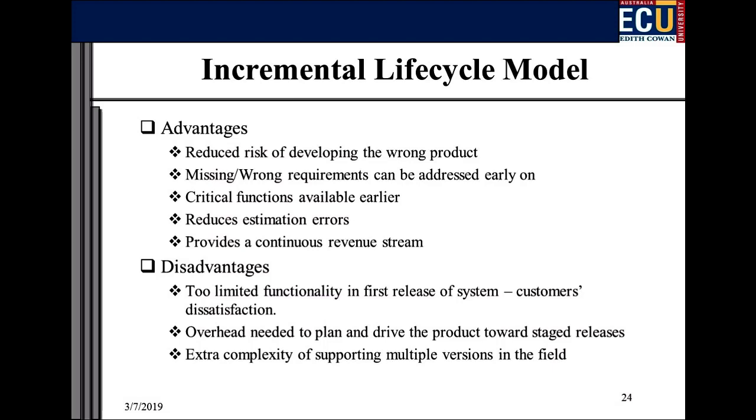if that's how you prioritize it, and that's how you should prioritize it. The classic, though, when I have applied IT projects and I tell them that they should use this incremental iterative process, and I want to see something every week, they give me their proposed schedule, and I look at it, and at the very start they have working on the user interface, and the most critical thing, the thing that I actually need, because it's the hardest thing, they put at the very end.